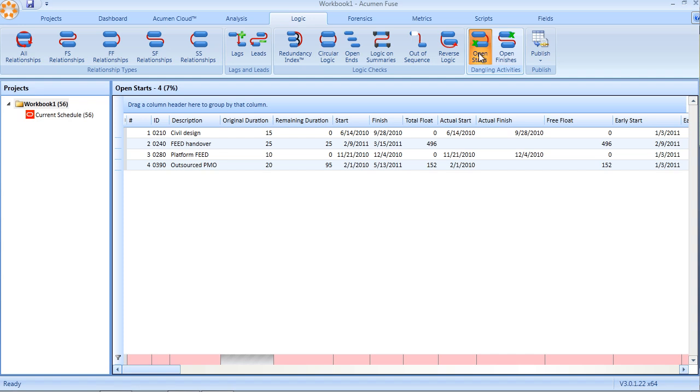Likewise, with open finishes, if an activity has a successor that is tied to the start of the activity rather than the finish, the end of that activity is left as an open finish or a dangling finish. These three core checks are essential in ensuring sound quality of logic, which of course then leads to sound quality of schedule.